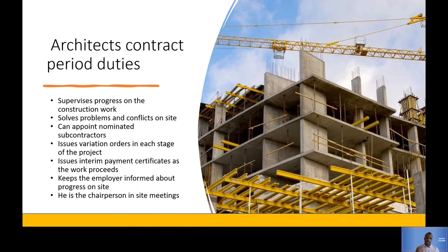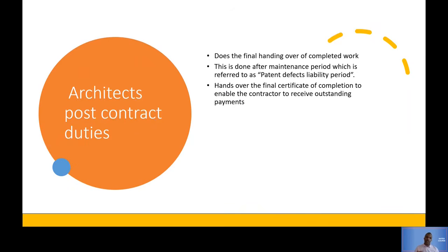Now let's talk about the duties post-contract, which means after the construction has been done. The architect does the final handing over of completed work, which means that the architect is the one then who gives the employer the completed work, who hands it over and says construction has been done according to my design. We have finished it. Here is the building now. Are you happy? Okay, so that is what the architect does.